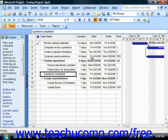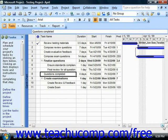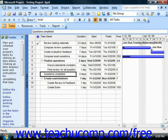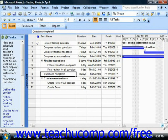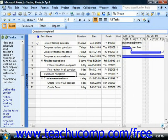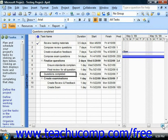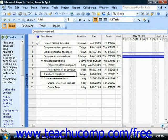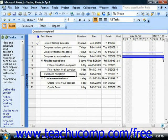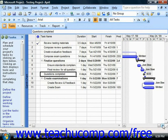You can easily format a Gantt chart view to include meaningful information and formatting based on various criteria, such as changing the appearance of critical or milestone tasks within your project file, by using the Gantt chart wizard that's available in Microsoft Project.